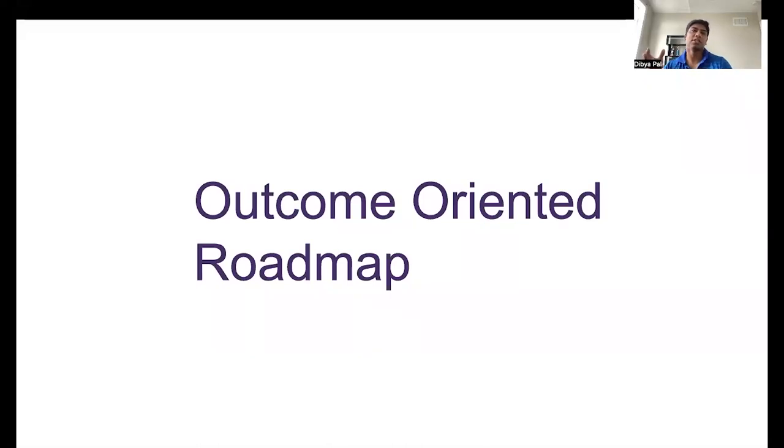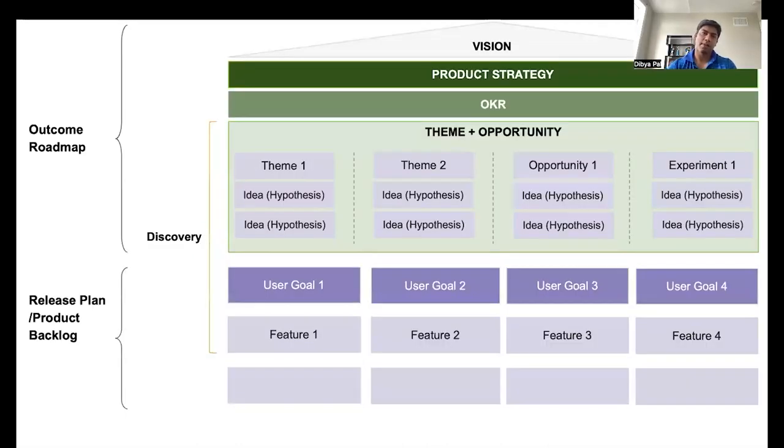The answer to this is outcome-oriented roadmap. So what does the outcome-oriented roadmap look like? Outcome-oriented roadmaps actually focus on value rather than features or dates. These roadmaps have four important components: vision, product strategy, goals or the OKRs and themes. In this roadmap, it's important to ensure that we have a clear lineage and alignment between the vision, strategy, OKRs and themes.